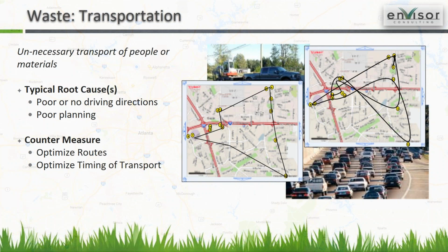The average speed was surprising. The average speed was about 20 miles an hour or less, which surprised me because it seems like we drive around at 50 or 60 miles an hour or more all the time, but we really don't. We spend a lot of time at traffic lights and in traffic jams and in parking lots and on side roads, and your average speed is nowhere near your top speed. And the math says that if you travel 20,000 miles at 20 miles an hour, you actually spend 1,000 hours a year in the truck. That's a lot of time.